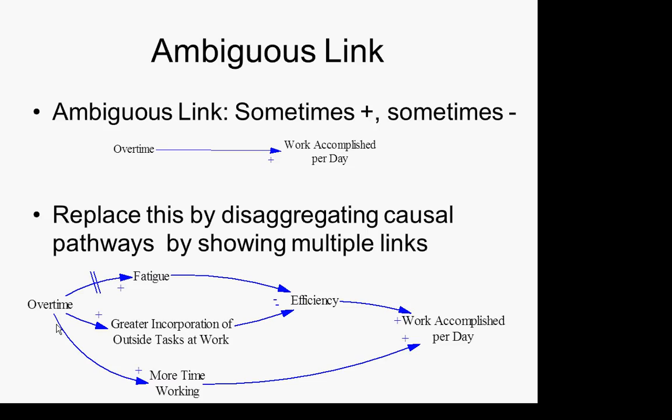Now consider the upper pathway through fatigue. You increase overtime — will that tend to increase or decrease fatigue? Increase. And will increased fatigue tend to increase or decrease efficiency? Decrease. And if you were to decrease efficiency, would it lead to greater or lesser work accomplished per day? Lesser. So there's a net negative path along that top line. We can figure out the polarity of the path by simply multiplying the polarities of the individual links: two positive links and one negative link yield a net negative path.